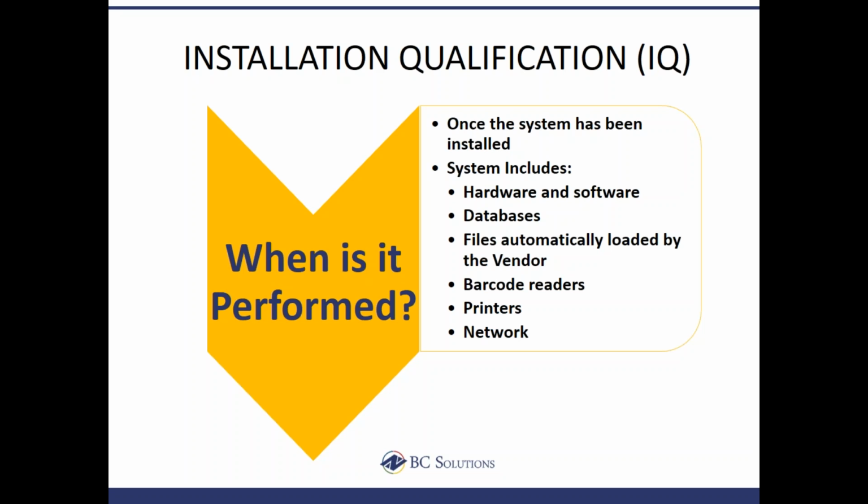and then you have a problem later on in your validation processes, you'll never know if the problem is with your hardware itself. So installing and doing an installation qualification on your equipment can rule that out so that you know it's working. So anything that happens that I find that's not working correctly later on in my validation activities, I can be pretty sure it's the software or the configuration that I set up that's making it not work correctly.